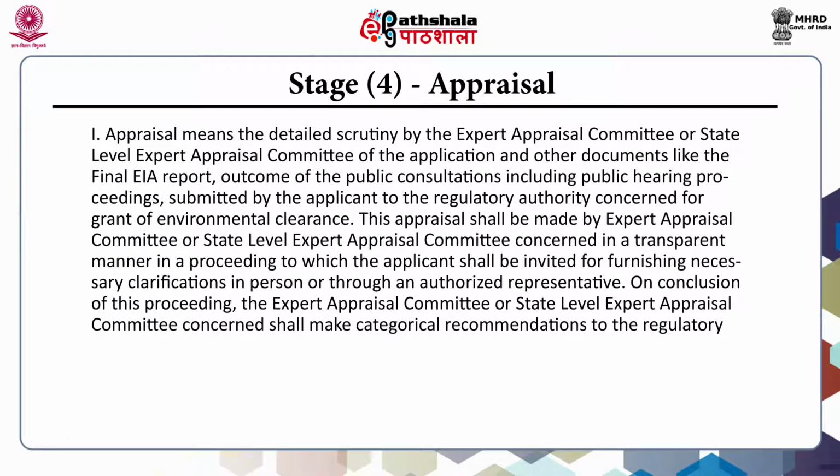Stage 4 is appraisal. Appraisal means the detailed scrutiny by the Expert Appraisal Committee or the State Level Expert Appraisal Committee of the application and other documents like the final EIA report, outcome of the public consultations, including public hearing proceedings, submitted by the applicant to the regulatory authority concerned for grant of environmental clearance.